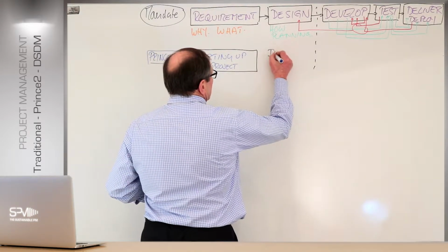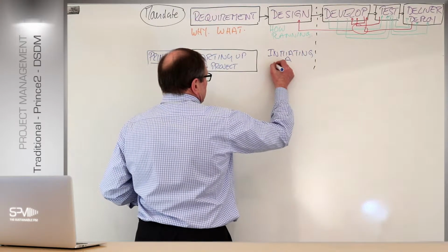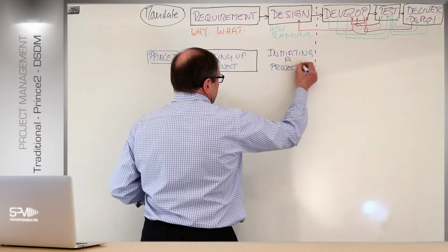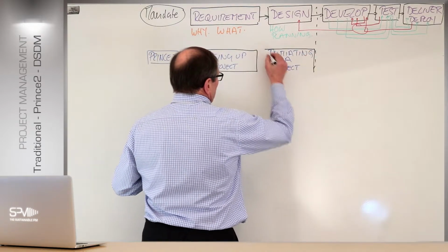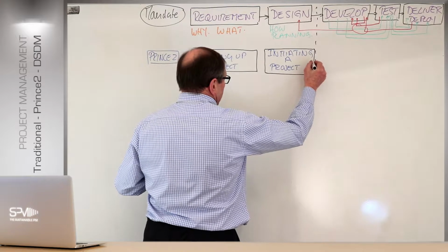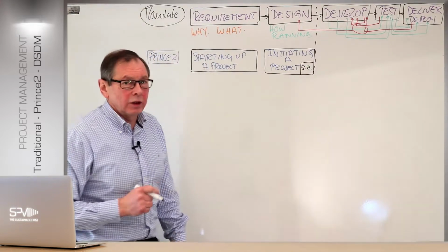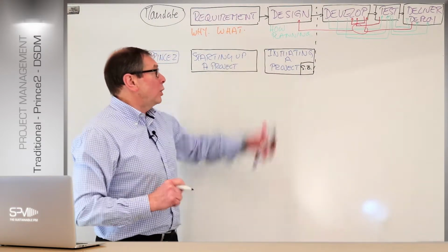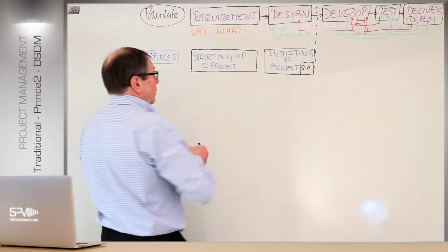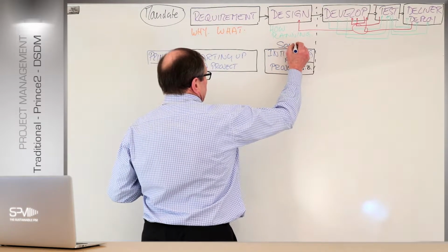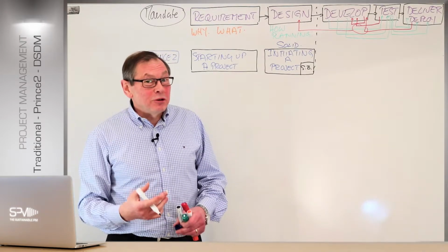Once we've done that, we then need to go into initiating a project. So this is the next process that PRINCE2 has, right? Now it also calls it a stage, because now there's quite a bit of work going on in here. So what they also have is something called a stage boundary to mark the end of that particular stage. But it's a process, putting the design, putting the planning together, right? Now, traditionally, PRINCE2 puts up here solid foundations, right?